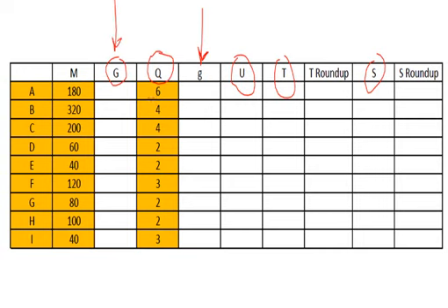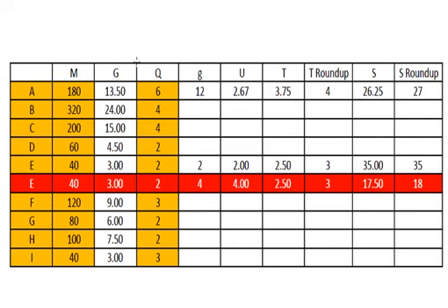Alright, so if we move on to the next slide, there I've calculated basically G for you, just using the simple formula there, 3 times M divided by 40, and the 40 we get obviously from the week that we've got, 5 days at 8 hours, so that gives us the time that we have to use. Alright, so that's where the 40 comes from in that calculation.